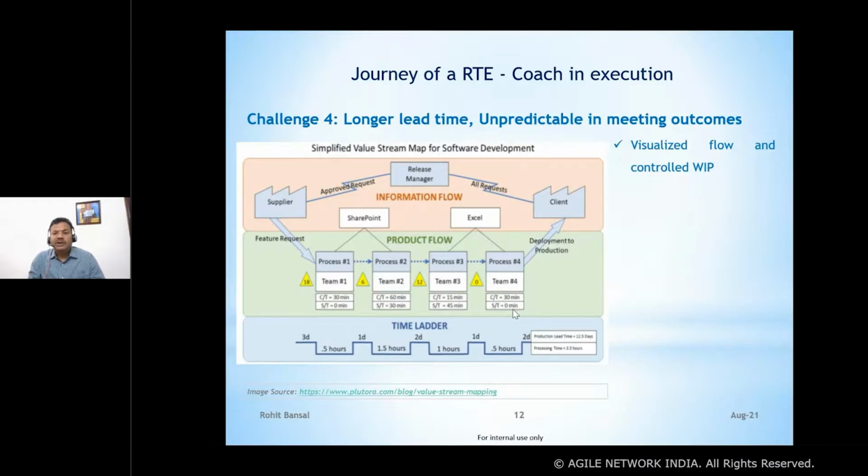So we started using the cumulative flow diagram in the system demo, and started showing, at ART level, what our work in progress is at team-of-teams level. Similarly, I talked to Scrum Masters, and they also started using CFD, cumulative flow diagram, at their team level retro in between sprints. And they understand what things are taking longer than expected, where they get stuck.